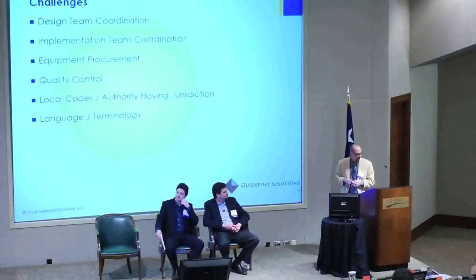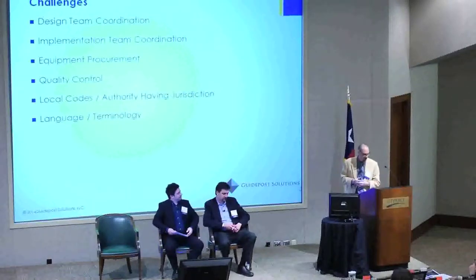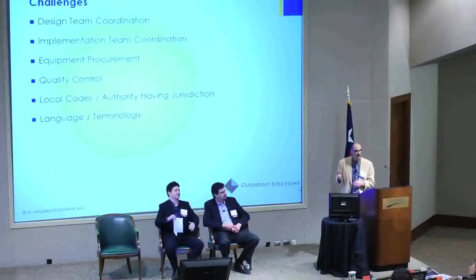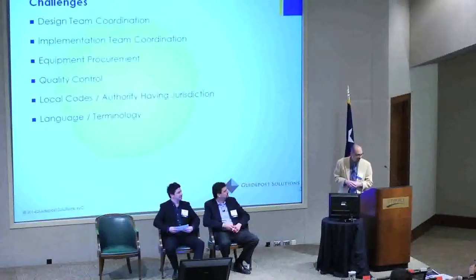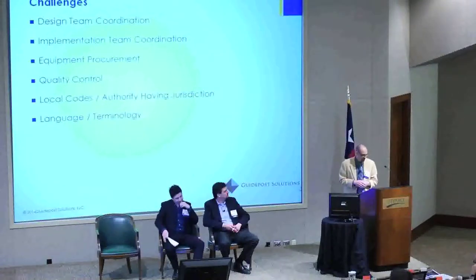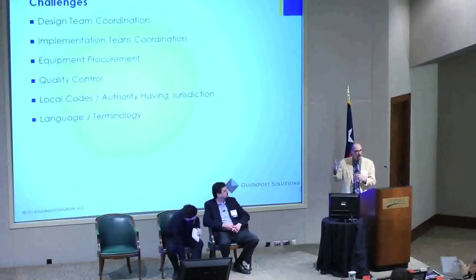Milestone dates would be, for a data center: When is your primary point of presence room going to be ready? When is your main point of entry room going to be ready, or IDF, or whatever you call it? When are your network go live dates? When are you doing critical systems testing? Site data center turnover dates. Those are very key when you're working with another country in different time zones.